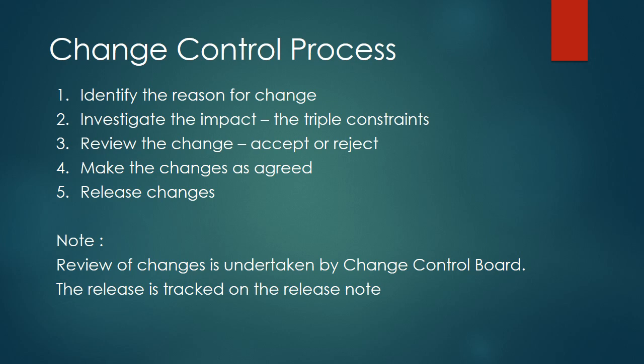Now, as written in the slide also, the reason for the change is justified, the impact is studied, the change can be accepted or rejected, and this decision is made by the change control board. After that, the change will be incorporated in the project. There will be resynchronization done to the rest of the project plan documents. Again, the design might be changed, the coding might be changed, and there will be new coding done or changes to the old code that was written, and then there will be a release.